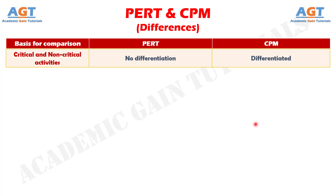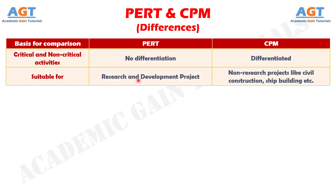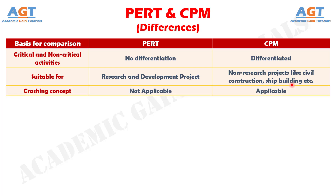Number 11: There is a demarcation between critical and non-critical activities in CPM, which is not the case in PERT. Number 12: PERT is best for research and development projects, but CPM is for non-research projects like construction projects. And difference number 13: Crashing is a compression technique applied to CPM to shorten the project duration along with the least additional cost, but the crashing concept is not applicable to PERT.